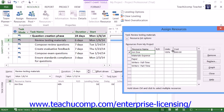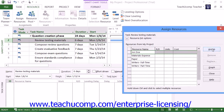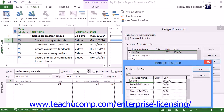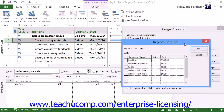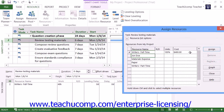Note that you can also remove work resources in this dialog box by selecting the resource to remove and then clicking the Remove button to remove the resource assignment, which will also impact the units and cost shown. If desired, you can also substitute one work resource for another by selecting the assigned work resource to replace within the list and then clicking the Replace button to open the Replace Resource list. Select the name of the substitution work resource from this list and then click OK to substitute the resources. Note that substitution may or may not change the units and costs shown.